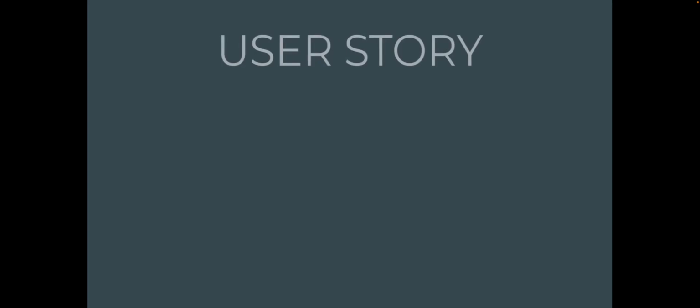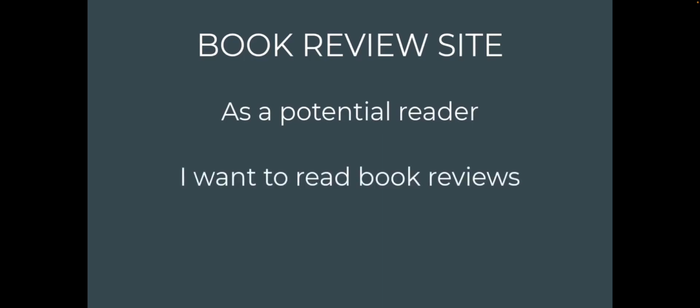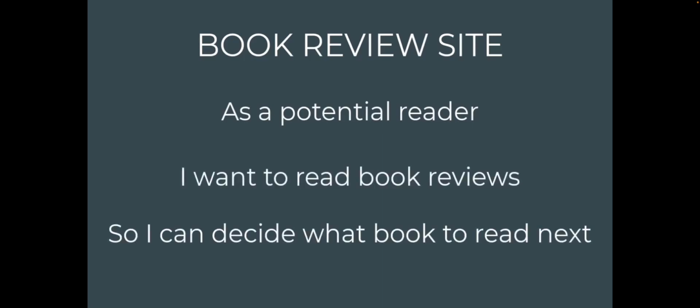Once you determine your MVP, the next step is to start with the user story. Hypothetically, my MVP is going to be a book review site. What would be the user story for this? Well, here's one example. As a potential reader, I want to read book reviews so I can decide what book